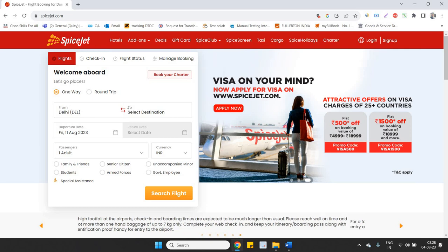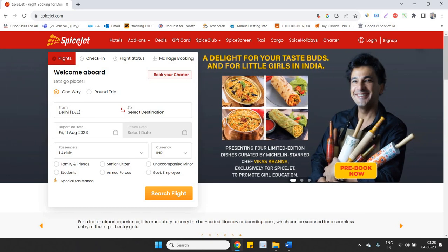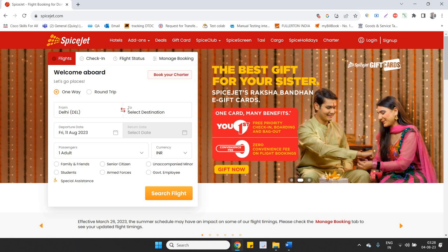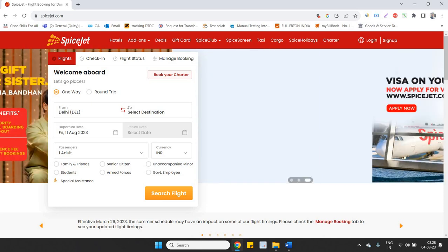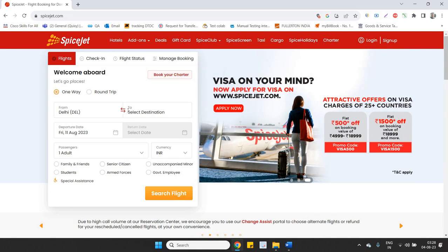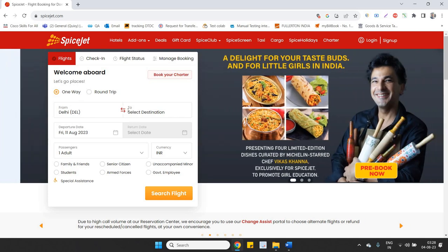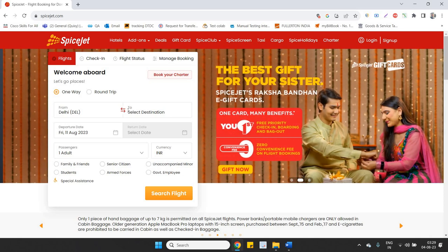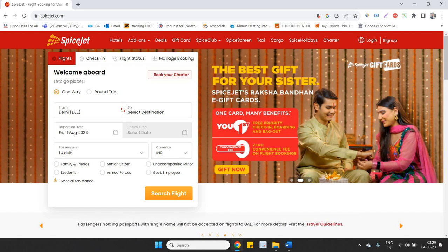Because, let's say, one task, a particular story, or around 2 to 3 stories were carried forward to the next sprint. And in such cases, we cannot predict that every story will be completed within the sprint, right? Because already there are 3 stories that were carried forward to the next sprint, and in the next sprint we are picking up new stories along with these. So in such cases, most probably there will be a miss in the SLA.